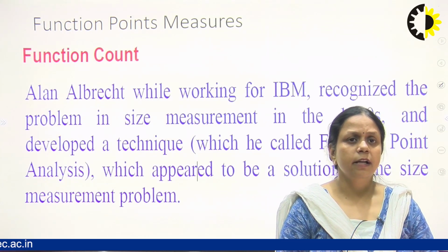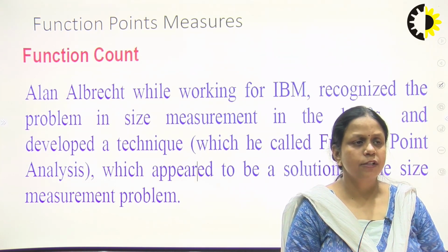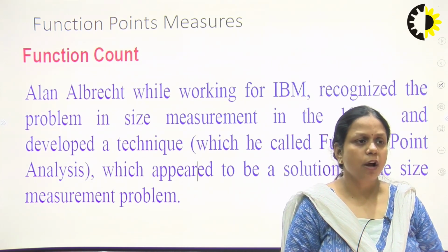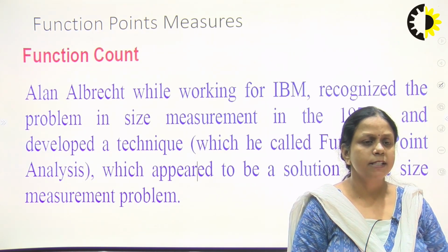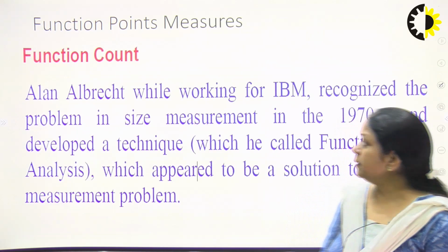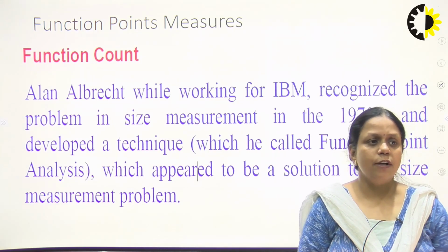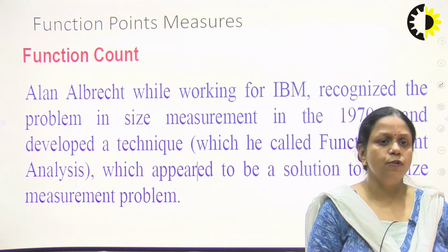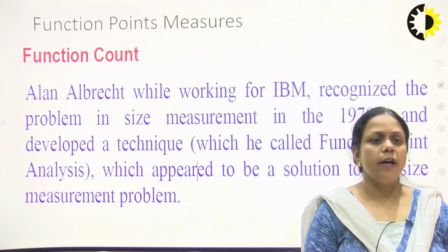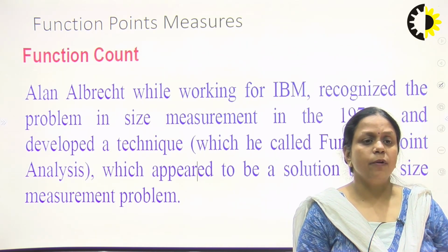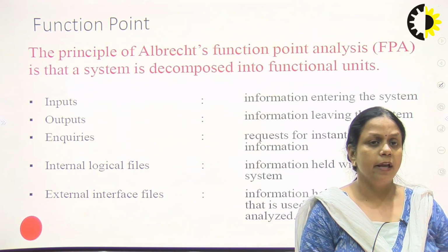Now the next technique is the function point measure. What is the meaning of function point or function count? Alan Albrecht, while working for IBM, recognized the problem in size estimation in the 1970s and developed a technique called function point analysis, which appeared to be a solution to the size measurement problem. This is again a technique to find out the size of a particular software, developed by Alan Albrecht.